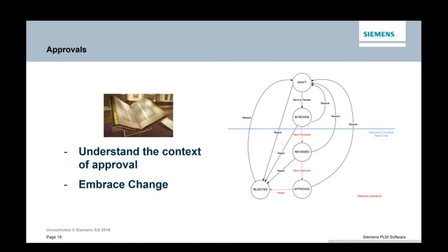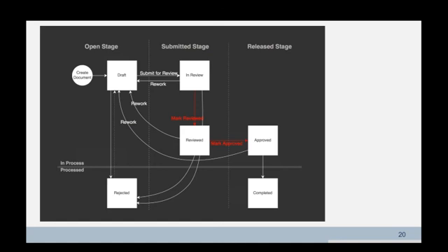For approvals, I believe that as we were speaking about traceability, requirements in context, the same should happen for approvals. What I'm saying is that you need to differentiate between sequential and parallel approvals. I will give you an example: you create a document, you push it into the draft status, you submit it to review. From review, you push it to the review state, from review to approved, from approved to completed. You can think about the full process regarding your requirement specification documents, but some of those arrows are marked as red. These are actually the cases when people need to sign the actual transition.